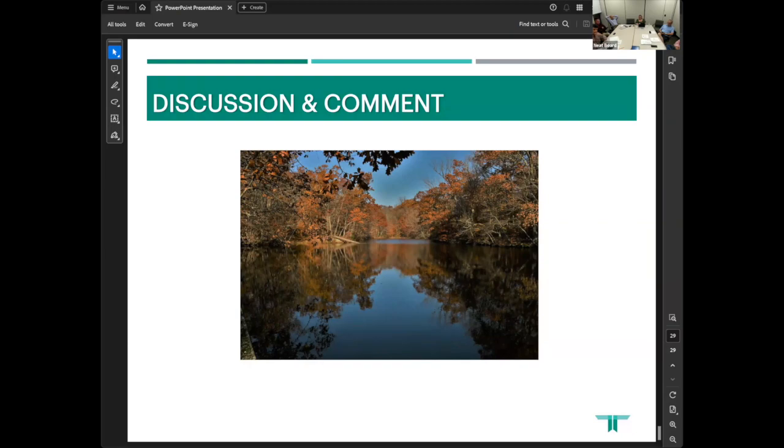Great, well, thank you. We'll be seeing you again in summer, is that what we're doing next? Yeah, because I think there was a message which Mark alluded to, that we want the process to be that the town board as lead agency issues a negative declaration for the project, and then ERB could consider issuing the wetlands permit. Because if you reverse that, if something happens with respect to the SEQR, then it may change the project, which then puts them back here anyway, because you approved something that now is not applicable.